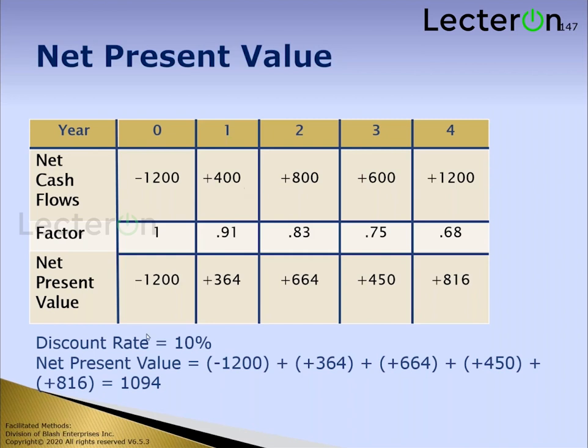And actually, if I'm looking at a discount rate of 10%, there's a formula, but it basically comes out to you get about 90% after 1 year, just a little bit more than 80% the second year, a little bit more than 70% the third year. And therefore, what you do is you adjust these numbers and you add them all up. And that net present value is the sum of all of these numbers.